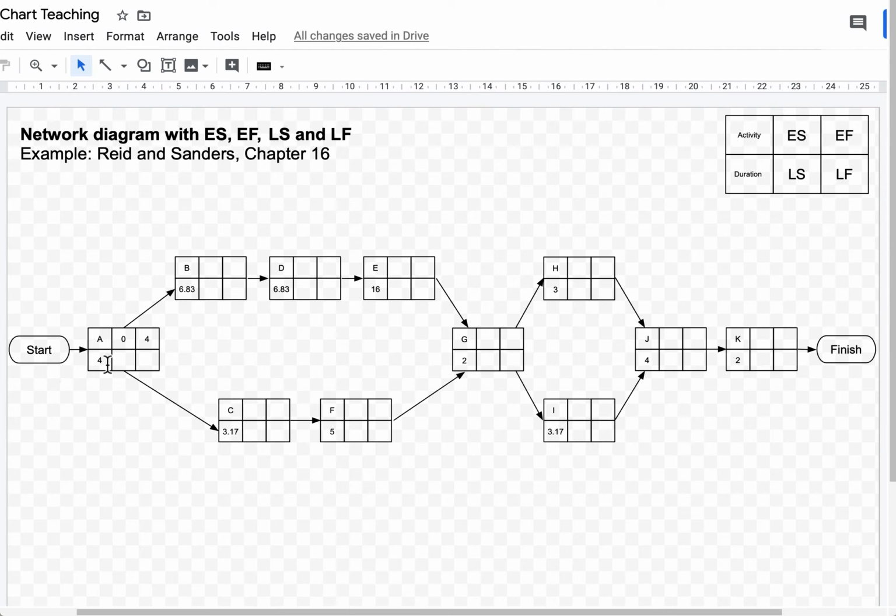And what I've done is I converted the circular nodes into a box. So before we just had a circular node with A4. Now we have a box for each of the same circular nodes. I also added the start and the finish, which I highly recommend because otherwise you might get confused, especially if you start off with 2 tasks. You wouldn't know how to start it off.